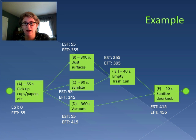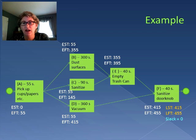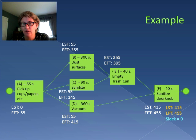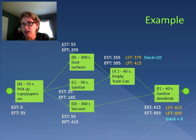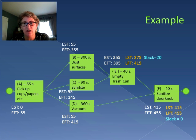That was our forward pass through the process flow diagram. Now let's do our backward pass. Activity F, since it's the last activity, finishes at 455, so the earliest it can start is 415 and the latest it can start is 415 as well — that activity has a slack of zero. Now let's go back to Activity E. Activity E must be finished by 415, so that's the latest finish time. When we subtract out the 40 seconds of the activity, the latest it can start is 375. So there is a difference of 20 seconds between the early start time and the late start time — that's the slack for Activity E.